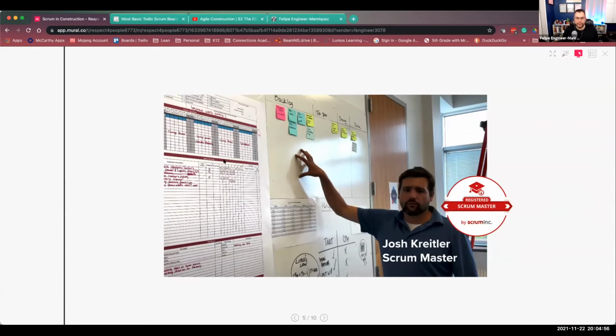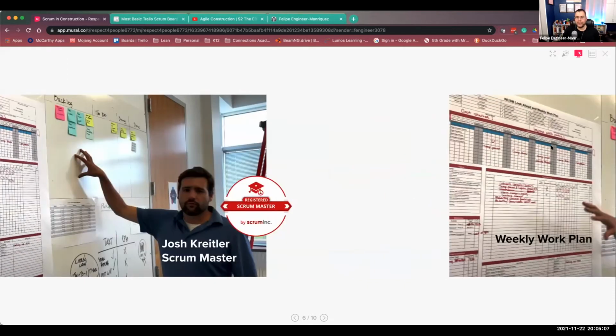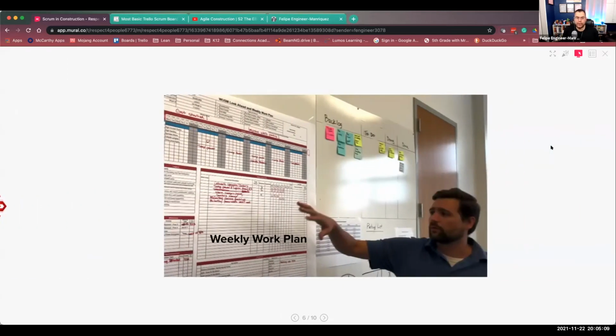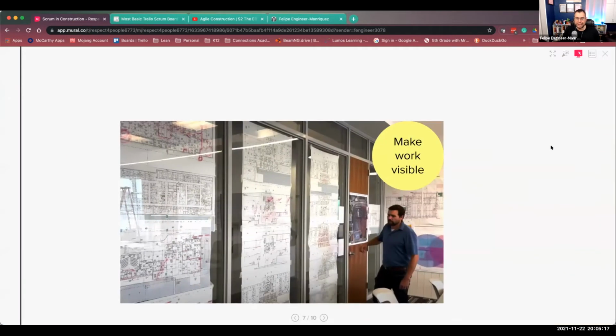And here to the left, we have a weekly work plan that helps the teams on multiple floors on this 10+ story building handle all of the different areas and phases and raising constraints. We call it the weekly work plan in Last Planner System speak, which you might call in CPM scheduling the near-term, short-term schedule, but it is not the same thing.